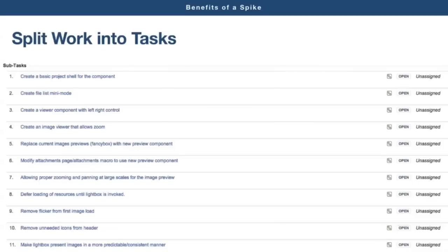And whether it's a visual spike or a technical spike, do a demo at the end. It will help you figure out whether the spike went well, whether you should adjust for the next spike, whether spiking in general is a good idea for you, or whether you should be adjusting it and writing prototypes instead of doing spiking. And when a spike went well, it's very tempting to start building on top of the code that you wrote in the spike. Remember that it's throwaway code.